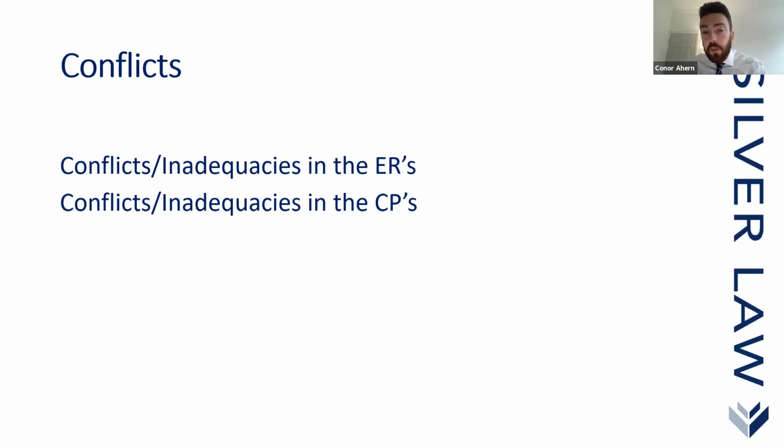Reason being, if the contractor was entitled to a variation for errors in the contractor's proposals, then you may come into ground where there could be some sharp practice, where the contractor could purposely underestimate the value of his contractor's proposals in order to effectively keep his bid artificially low. I wouldn't agree with that, because that's putting the employer on the hook. It's just kicking the can down the road, where the contractor comes back and says, my CPs aren't good enough, but I'm still entitled to a variation. That's not the position, and there's good sense to that.